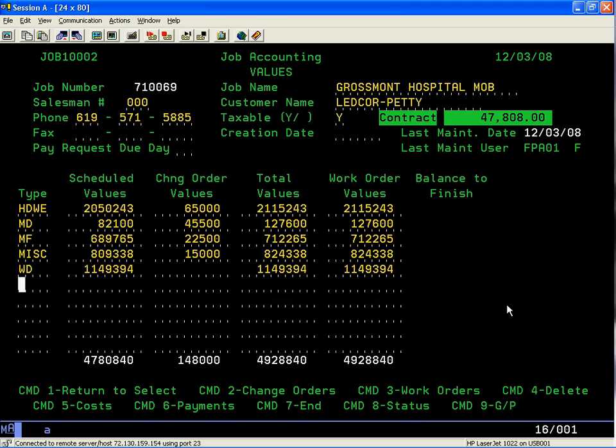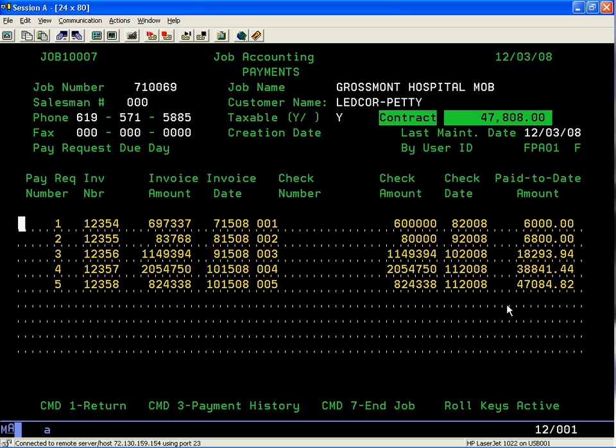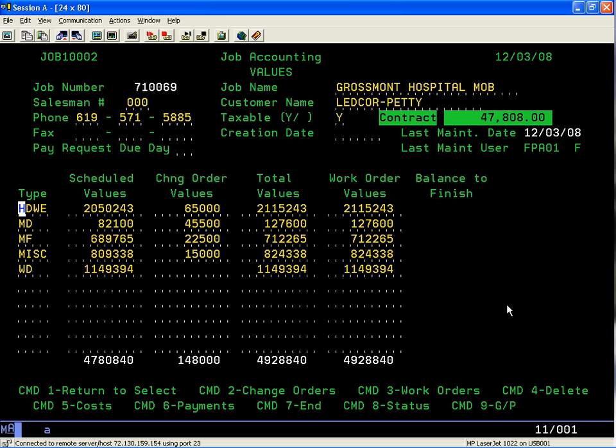I just went back to my contract value screen. Command 6 shows me my payments. You can keep a running log of your invoice amounts, date of the invoice. When a check comes in from your customer, you can keep that record going here. This is important because this information will carry over to your monthly pay request.